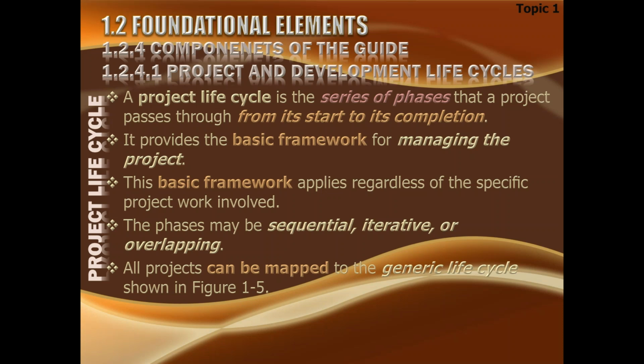That is a very important thing when you are actually handing over this house and taking over and transferring the ownership or whatever you want to do. So those activities are also very laborious. You see, till the gray structure, it can take very less time. Maybe in 2 to 3 months you can have the gray structure ready. But once it comes to the fourth phase, that is the finishing, that takes another 3 to 6 months. And then taking over will also take another 1 month or so. I'm just talking about a simple house, right?